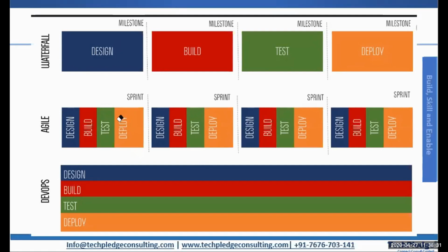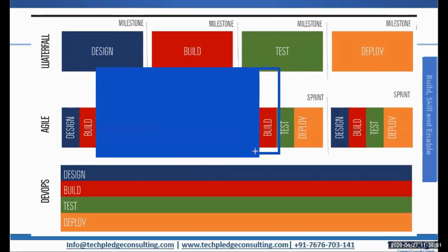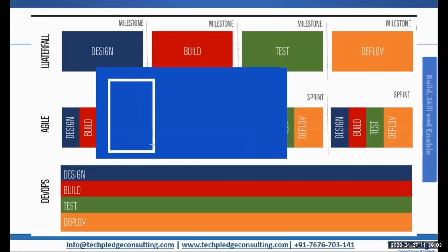Under an epic, what all would be phases? Issues, correct? And issues would be sorted by what? Tasks. Right? So let's say this is one project of my learning portal, correct? Now in this learning portal, I divided it into certain milestones, like my virtual classroom is ready. That is one milestone. Then what would we call this milestone? Epic.